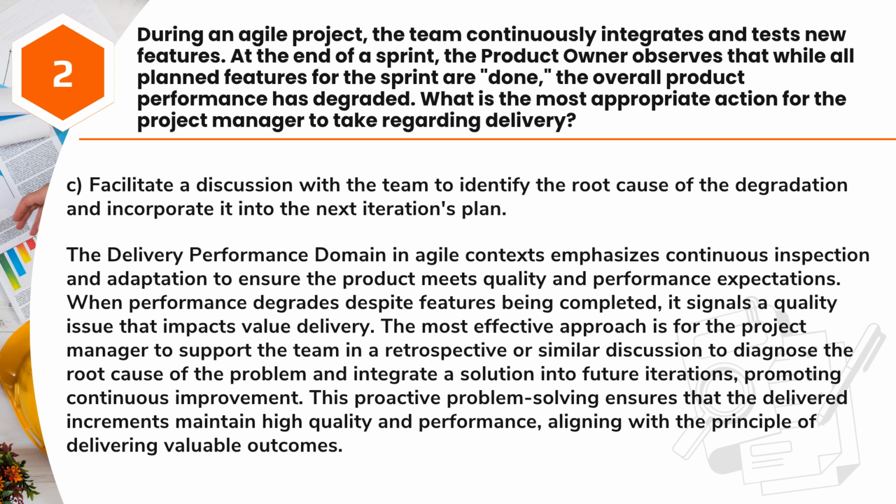The most effective approach is for the project manager to support the team in a retrospective or similar discussion to diagnose the root cause of the problem and integrate a solution into future iterations, promoting continuous improvement. This proactive problem-solving ensures that the delivered increments maintain high quality and performance, aligning with the principle of delivering valuable